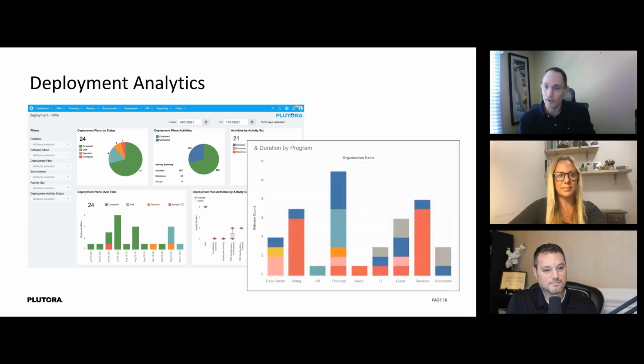And on the deployment side, it helps me highlight where the problems are, where we can fine tune things, which teams aren't planning well. So then maybe they say they need an hour, but they usually need 2. We can historically look at that. And sometimes we'll go back and say, hey, Jeff, I know you said you need an hour, but usually you need 2. Why don't we plan for 2? This way, something else doesn't slide at the other end.